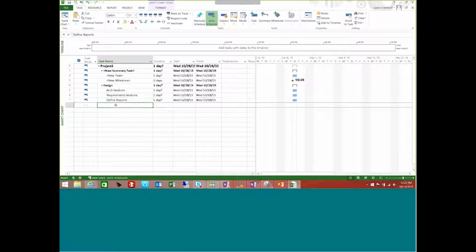When I'm done, I could say design or design complete. I apologize in advance, not the best typist. All right, there you go. Because I gave this 0 duration, Project knows that this is a milestone. Any task with 0 work or duration will be automatically marked as a milestone here.